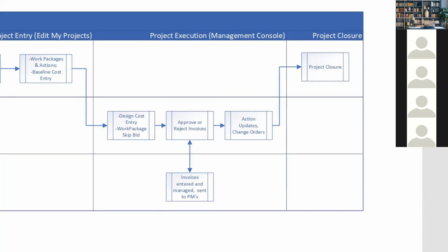From Commons' perspective, she or her team will get invoices in, and they will email them to you as a project manager. Your job obviously is to go in and approve or reject those invoices and send that in email back to Commons. Next question, congruent with what we're doing right now, is, Jerry, is there full email capability in Archibus to do that?